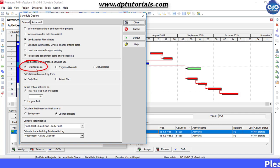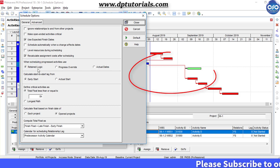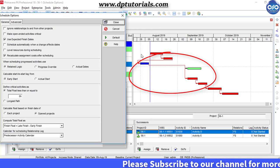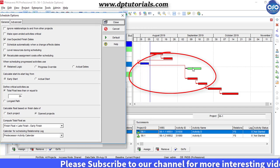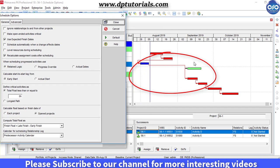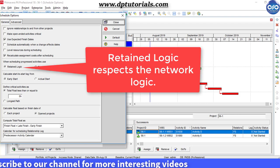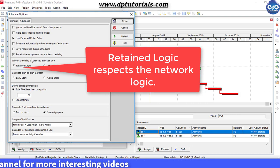When using Retained Logic, the activity that starts out of sequence, i.e. Activity C in this example, will have no direct impact on successors as this Retained Logic respects the network logic.